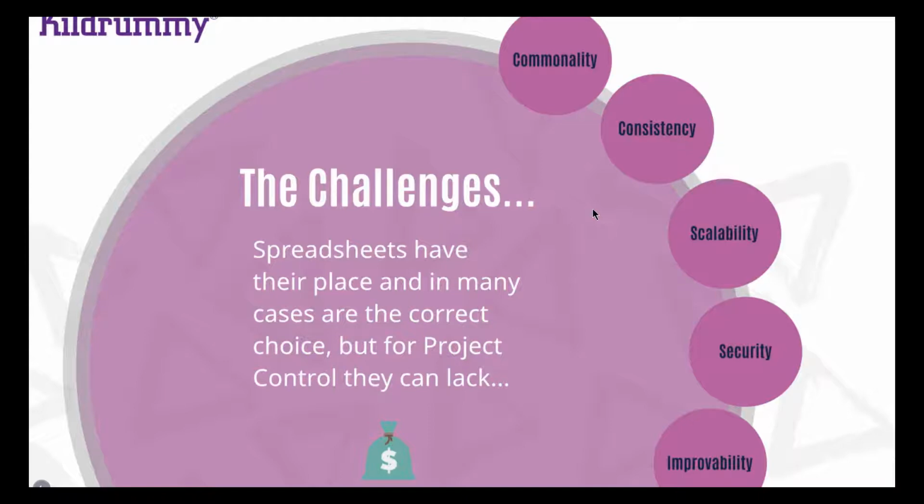We want to be able to learn what things we did well from one project to the next, and also, perhaps more importantly, we want to learn the things that we didn't do so well. So if we have common approaches into how we're collecting this cost management data, we can benchmark them against each other. We can't do that if we don't have a very common spreadsheet that's producing very consistent outputs. And in the cases that I've been involved in, every project really does look to reuse and reinvent the wheel when it comes to setting up Project B's brand new spreadsheet.